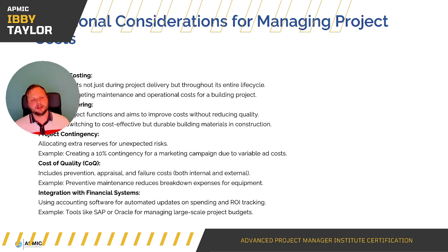Value engineering analyzes project functions and aims to improve costs without reducing quality. So switching to cost-effective but durable building materials in construction, is there anything we can do differently? Do we have to use the same supplier? Do we have to use the same materials? Do we have to use the same resource? Can we change it and still get the best possible outcome?